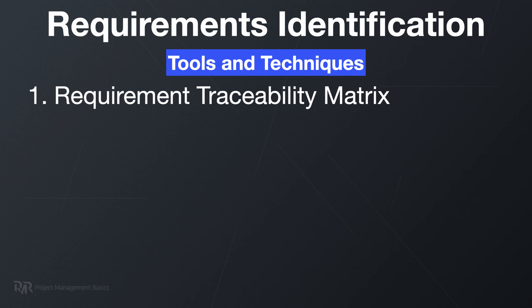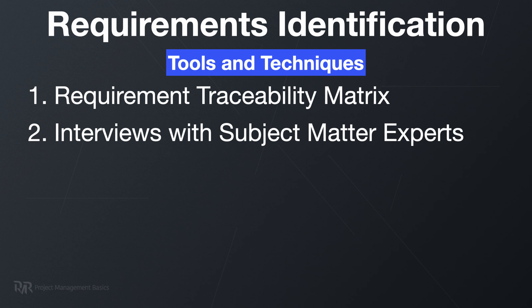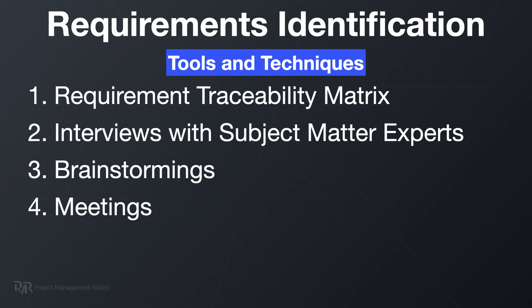You capture all these requirements into a requirements traceability matrix — I'll leave a link in the description to a video about RTM. For techniques, you will use interviews with your subject matter experts, brainstorming, and meetings to discuss possible solutions. The last and critical step is to get approval on all the requirements you collected and specified. You need to develop a process where your clients, customers, and stakeholders read through the requirements, certify they understood them, and agree on the approach.